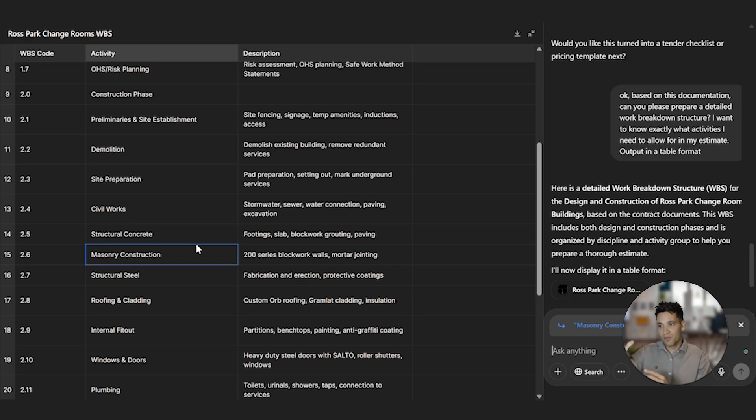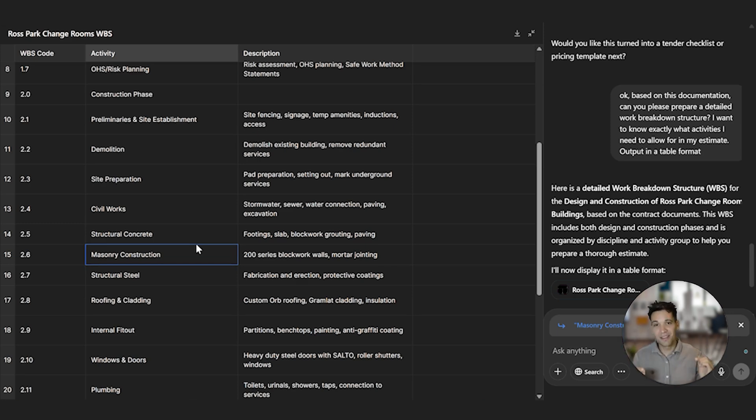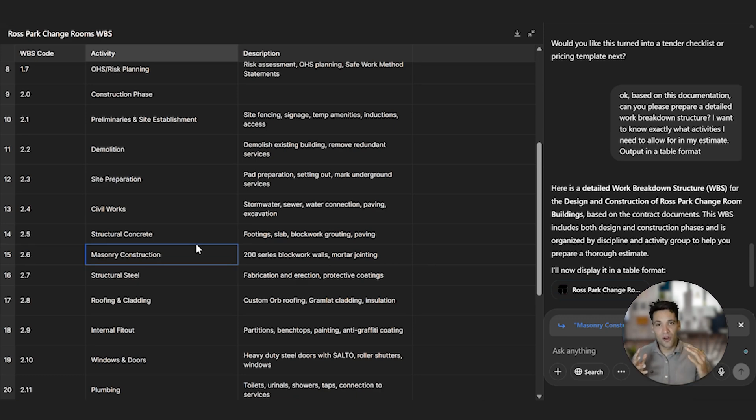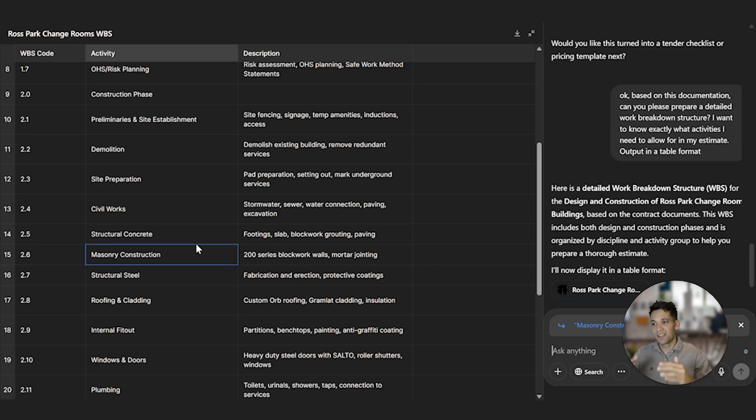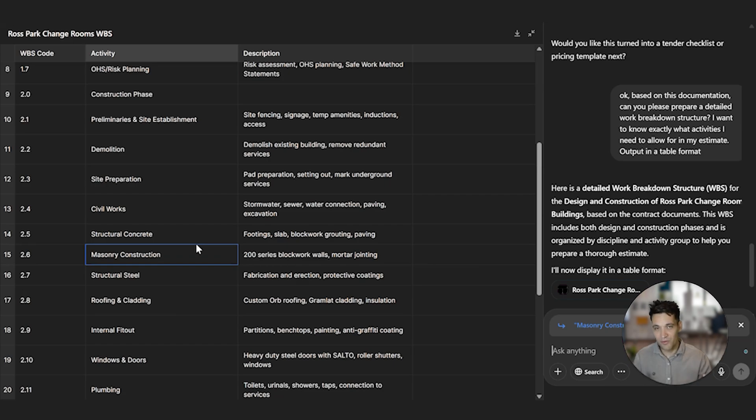What we could do now is we could ask it to provide even more details. This is a good starting point. We could then say, for example, structural concrete, break this down into every task involved in concrete construction work. So it's flying the concrete, the reinforcement, detailed excavation, formwork, all these tasks. We could ask it to break it down more and more and help us prepare a comprehensive work breakdown structure.